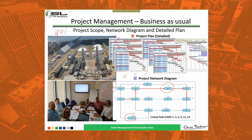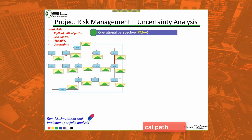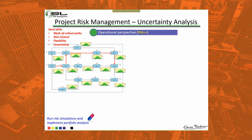The next important step is understanding that behind these activities, you have uncertainty. Can we have the permits in place? Can we mobilize and demobilize? Can we allocate people quickly on the platform? Can we get engineering and construction professionals to the site immediately, or do we need to wait? It is understanding, at least at the macro level, what are the uncertainties behind the activities — mobilization, demobilization, feasibility, financial investment decisions, and procurement processes. This is the role of quantitative risk management: to model, understand, and quantify the risk associated with the project.